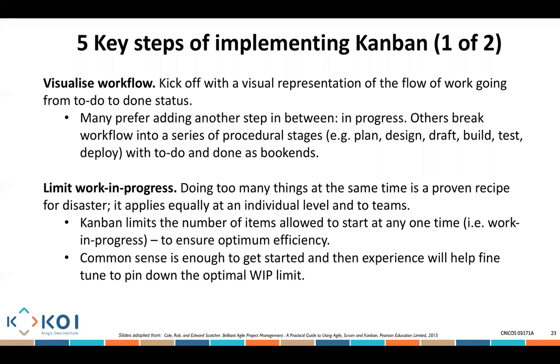What's going to happen is you're going to keep all of these, say 5 user stories that are 90% complete, but they're not complete as yet. You can't do that. Kanban says, let's limit how much work is in progress. If you have that limit, you cannot get anything else to work on before you finish what you're working on at any point of time.